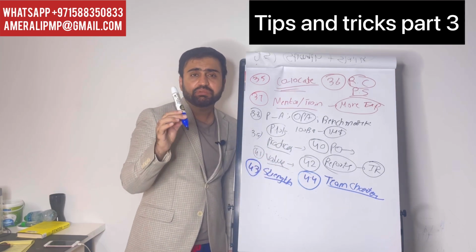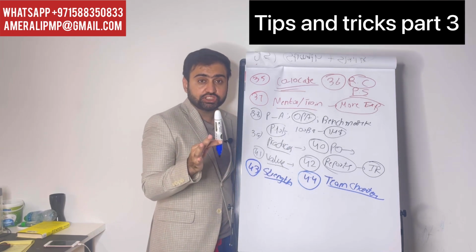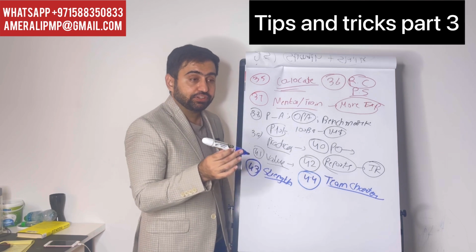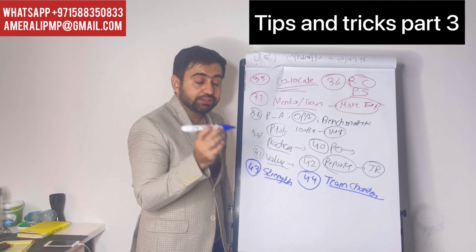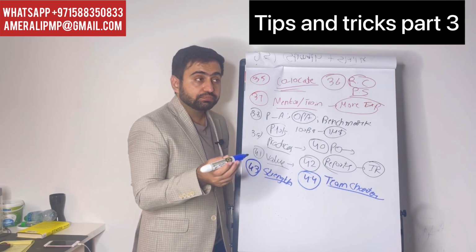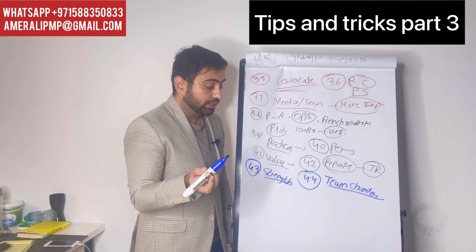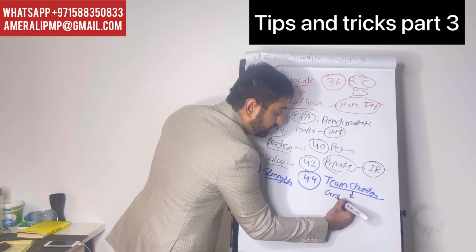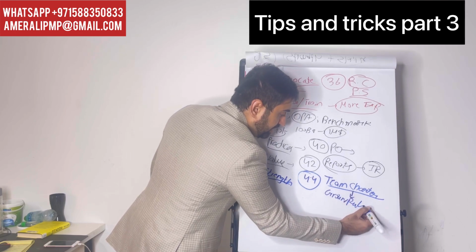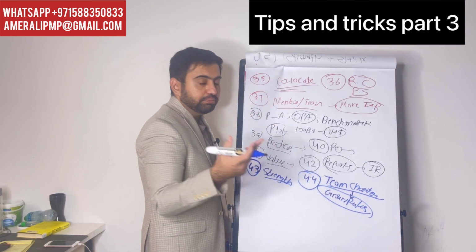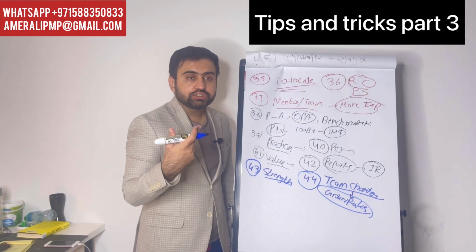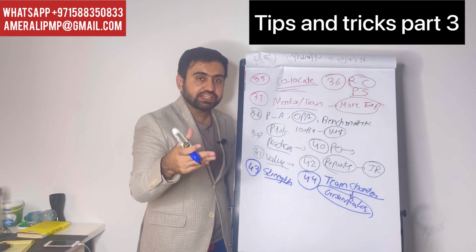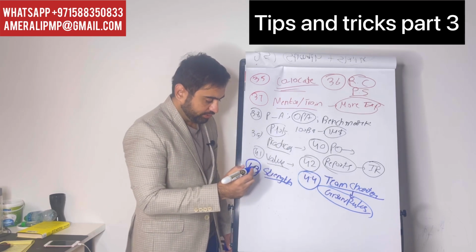Please understand that many people confuse team charter with project charter. Project charter is high level information. Team charter is specific information: the working agreement, how the team will do the work, their social agreement, how things will happen. A subset of the team charter is ground rules. It has only guidelines on how the team should behave, how they should respect each other, how they should start on time, and not use a mobile at certain times. Things like that come under the ground rules.